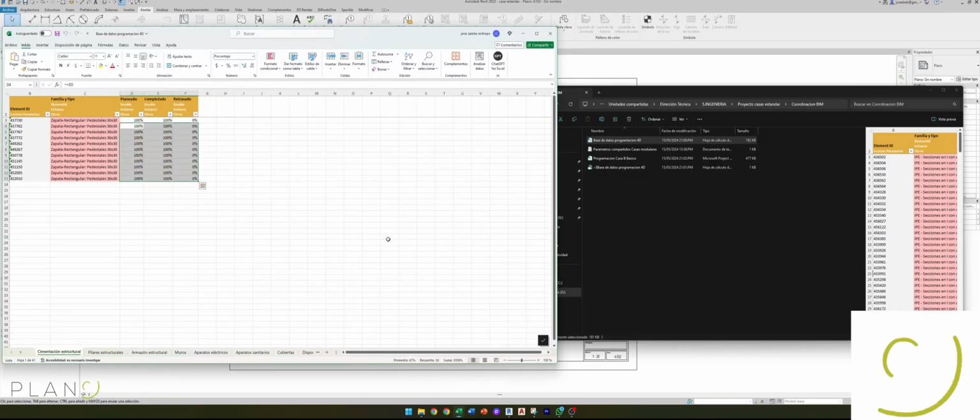This is a table exported from the same model with all the activities we want to monitor within the schedule, using a very famous plugin, one that most of us know, called Ideate or the Roots, which is free. Essentially, with this template, we export all the activities we want to monitor from the schedule and link the planned, complete, and delayed activities to the global project parameters. We save and close it.